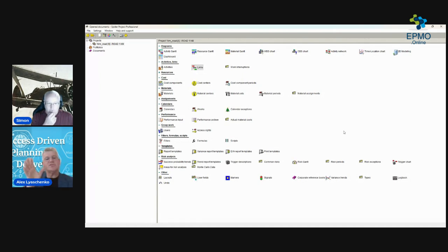Look, activities. So you say these certain activities are under risk. Risk does not just exist in general; there are general risks, but that's a different story. There are risks associated with a particular part of the project, and for these activities you say, which activities could be impacted by this risk? I mean direct impact, because there will be a follow-on effect. So if these three activities are under risk, that's my time window for this risk. Having these risks, you can put them in the Gantt chart view and say, this is all my risk, and that's when each risk may occur. But it's quite a new feature.